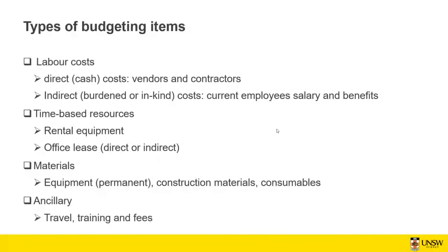If all the staff in that office are working on a single project, then perhaps all the rent you're paying for that office can be contributed to that project. But if the staff in that building are working on different projects, then it's going to be budgeted proportionally based on the type of the projects and the length of the project that they are working on at the same time.